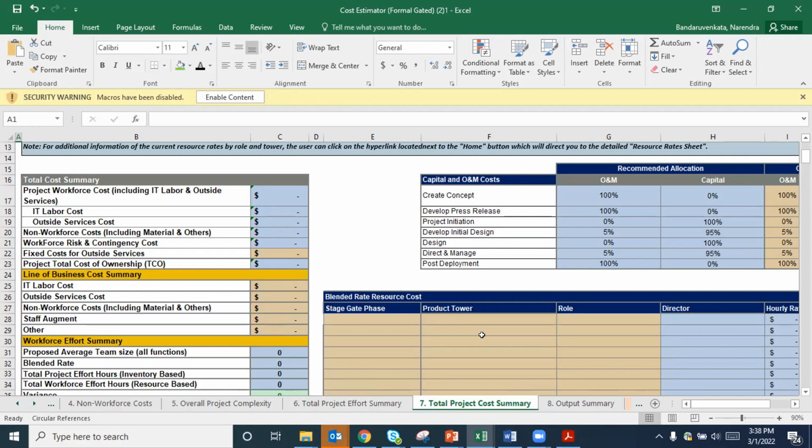Number two, for Long Island projects, if anybody is handling Long Island projects, there is a 7.5% additional cost that is loaded on the labor cost. All these are calculated and provided to you, so you don't have to worry about all these backend reference data. That is all there. And we will be maintaining from the EPMO perspective to cross-check these cost figures once in a while to see if anything has changed. Then we would adjust the reference data accordingly. Okay.